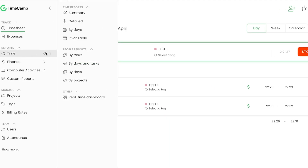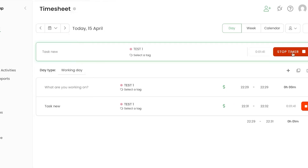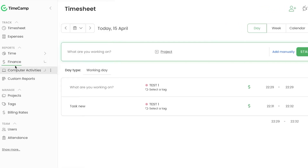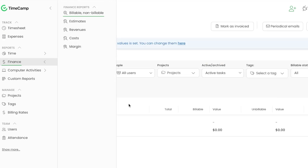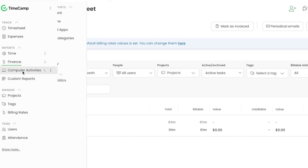Now let's go to Reports. Under Reports you can get a summary with details by date, and apply different filters. Under Finances you have billable estimates, costs, and margins. I'll stop the timer and go to Finances to view billable and non-billable hours, where you can also create invoices or export financial reports.